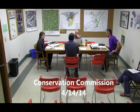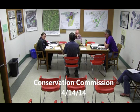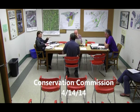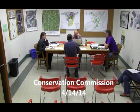Yeah, I'm not gonna leave them any room between the guardrail and the road. And the gate will try to stay in line with the guardrail. That's a good idea. It's essentially a cable on the continuation. The other side is down a hill enough where people can park there. Right, and they might do that. But that'll ask him to go in and unlock it safely. The other side is not as steep, so we're not required to put guardrail on the other side. It's a longer, flatter slope, 3-to-1 or something like that. So we're not putting guardrail on across the street, which won't surprise me, but it's money too. Okay. You're not gonna fight that?